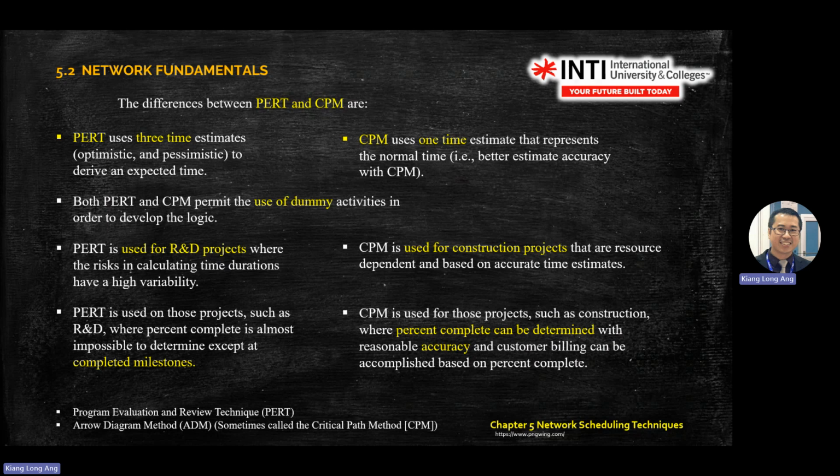CPM uses dummy activities, and usually PERT is used for R&D, while CPM is used for construction and so on. So this is the difference between the two.